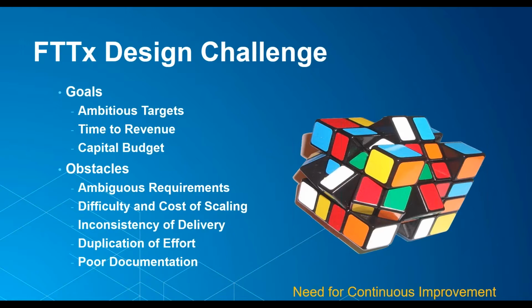So the targets are often very ambitious and very hard to achieve. So those are some of the challenges that we have. The other one is the time to revenue. If projects get delayed, the revenue doesn't come in on time, customers are dissatisfied, or you can completely lose the market opportunity if the competitor gets in there.